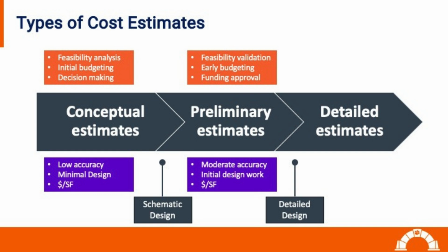Like conceptual estimates, preliminary estimates are usually based on the dollar amount per square foot of similar projects. However, at this stage, the estimates are generally more accurate due to a better understanding of the project scope.